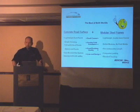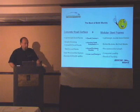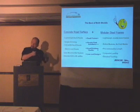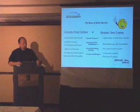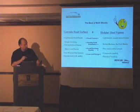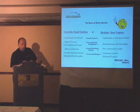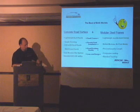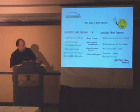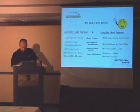Because if you're field welding on a steel frame, depending on what you're welding, it may require a certified welder. So we eliminate all the field welding. Sometimes a bolted splice, a bolted flange, a bolted arrangement adds some incremental cost, but from the standpoint of quick installation out in the field, it's all bolted modules. If cambering's required because of clear span length, then they're pre-cambered. It was a requirement for a low-cost design to have a composite deck loading and to be able to utilize standard trucks.